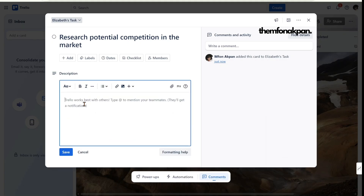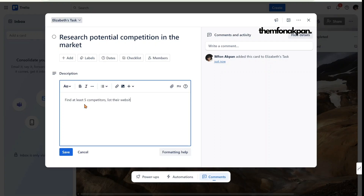In the description, add more details to help her do the task. Write: 'Find at least five competitors, list their websites, pricing, and features on a Google Sheet.' This provides more context. Click 'Save' when done.